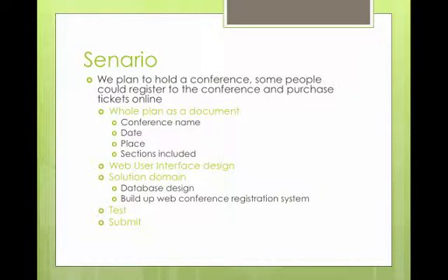While we are planning the conference, we can do basic website UI design. After that, we get the documents. We could specify the website and submit several versions to the manager to confirm the best one. At the same time, web system design could be started with database design. There will be UML design, object diagram design, and so on.